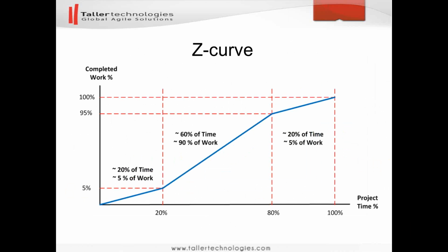Of course, these numbers may vary depending on the context, but the basic principle about the three sections is empirically validated. Only the second leg of the Z-curve is representative for the development system capability. It shows the common cause variation specific to each development system process. First and third legs of the Z-curve are project specific and are affected by special cause variation in this case.